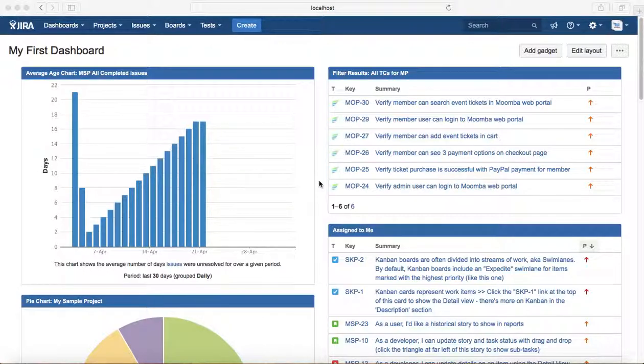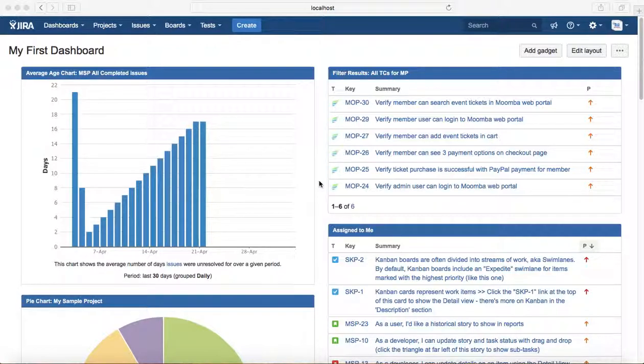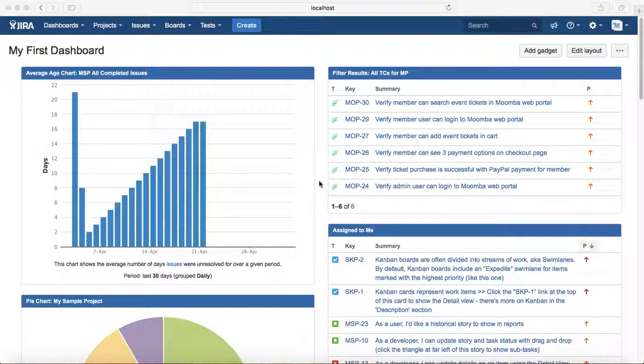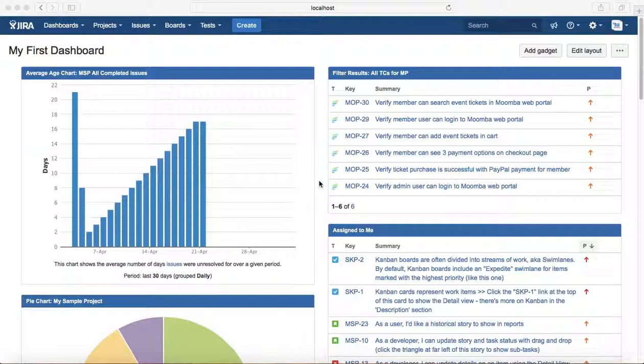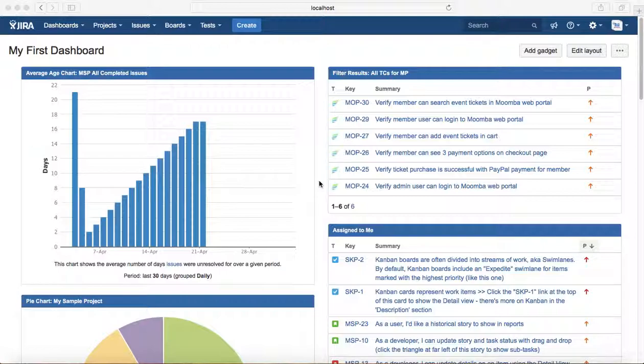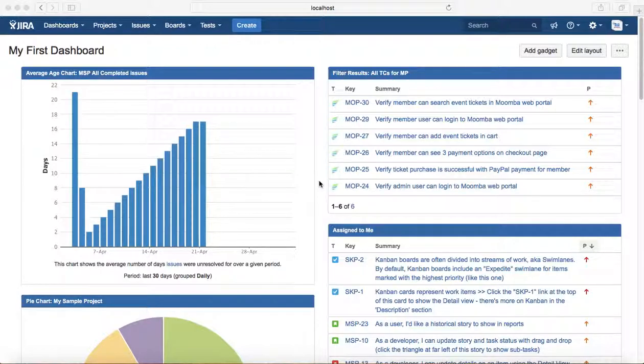The next board is the scrum board. Only admins can create scrum boards. Scrum board is for teams that plan their work in sprints or want to deliver working software in particular time-bound iterations known as sprints, which is like a two to four week cycle. For those teams, scrum board is the best option to get started.